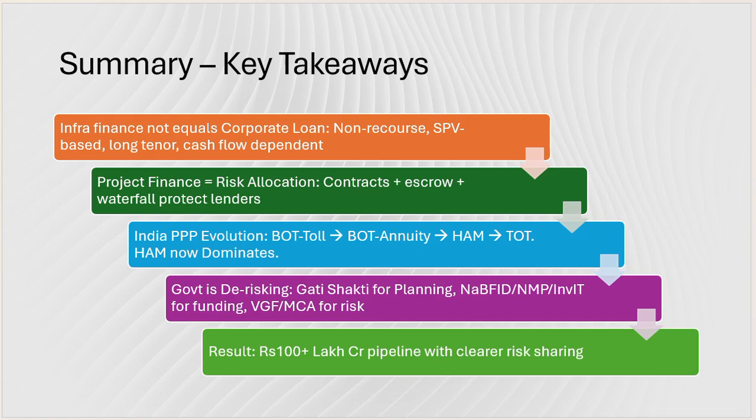Let's discuss that in detail, guys. Infrastructure financing is not equal to a corporate loan. Non-recourse, special purpose vehicle based, long tenure, and cash flow based financing is done in infrastructure financing, and it does not depend on the balance sheet like corporate financing does. Project finance is risk allocation: cash flow plus escrow plus waterfall, which the project lender follows. Then India's PPP evolution: BOT, toll, annuity, hybrid annuity model, and the TOT model.